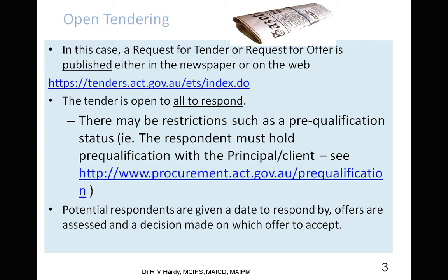Okay, so we have ideas as to how much things should cost, and so we are going to look at the prices that come in against this. So if something comes in unreasonably low or really cheap, then we're going to be suspicious. Either they've screwed up or we've screwed up, and we're going to be confident that we're not going to have screwed up by the production of good documents that limit the amount of screwing up that can happen.